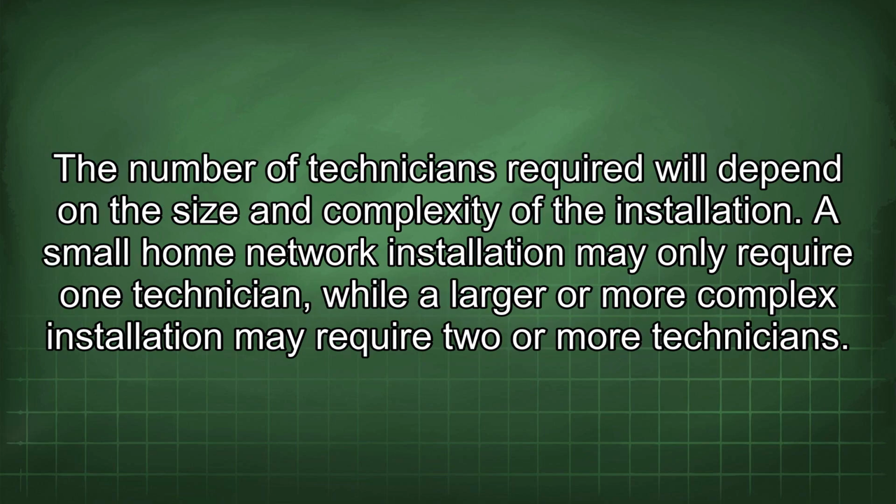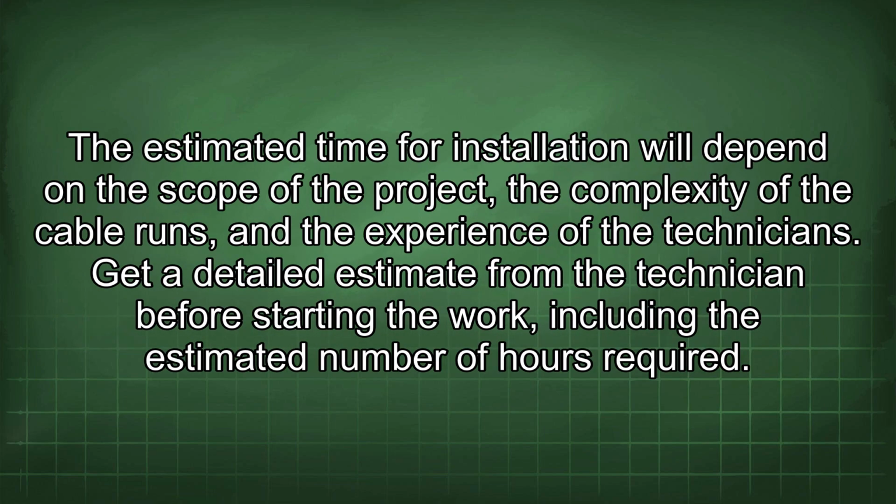The number of technicians required will depend on the size and complexity of the installation. A small home network installation may only require one technician, while a larger or more complex installation may require 2 or more technicians. The estimated time for installation will depend on the scope of the project, the complexity of the cable runs, and the experience of the technicians. Get a detailed estimate from the technician before starting the work, including the estimated number of hours required.